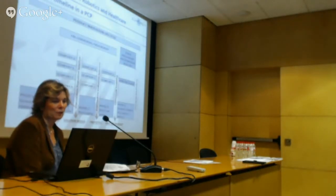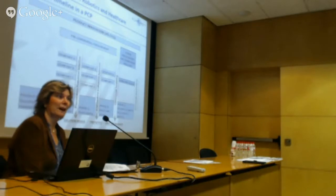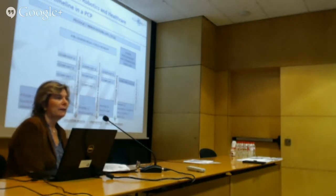Phase one, phase two, and phase three are the phases of a pre-commercial procurement, and with this pre-commercial procurement we will arrive at a pre-product. We won't arrive at a product, we will arrive at a pre-product. These three phases are narrowing-down phases, so we start with several selected proposals and narrow them down to arrive at at least two proposals. Why two proposals? Because if not, the public entity cannot do a normal procurement for this product. They need a competitive situation between several offers, so we need to arrive at two proposals.